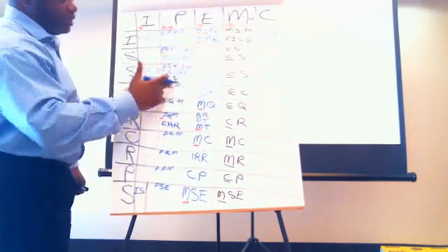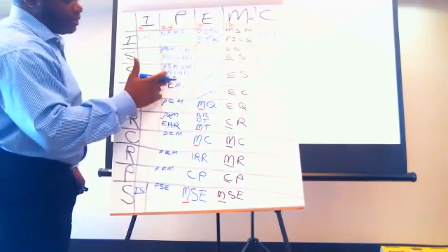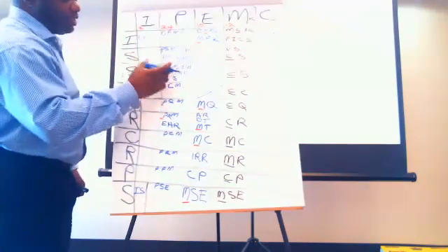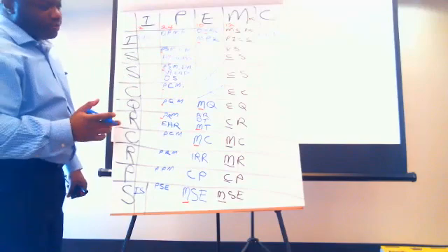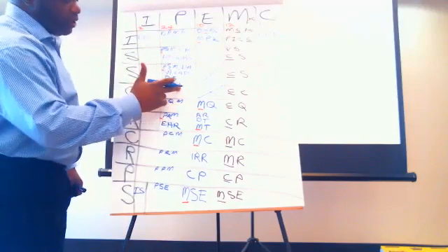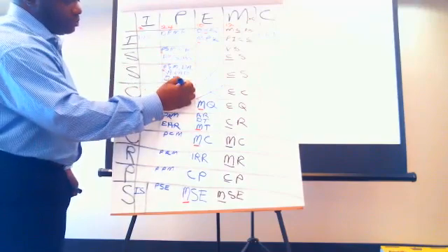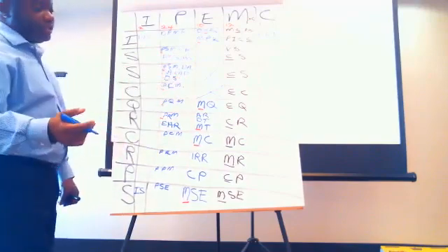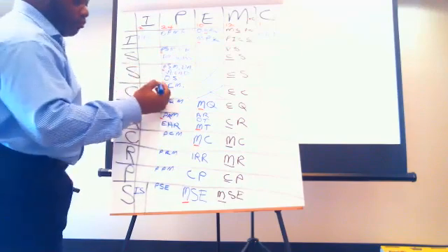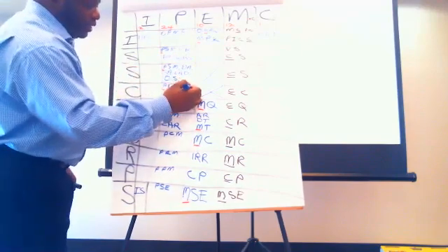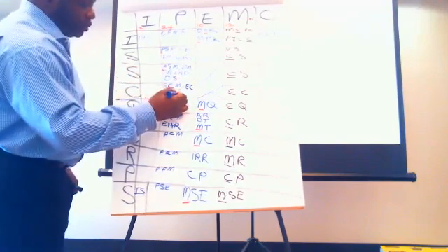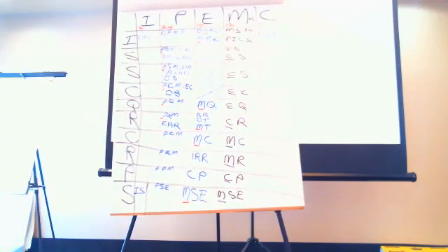This is a summation of everything you've done before it, and boom, you've got your schedule. Good. All right. So going into cost, what comes after plan cost management? Is it budget, or is it estimate, or what? Estimate costs, EC, and then determine budget. Good.